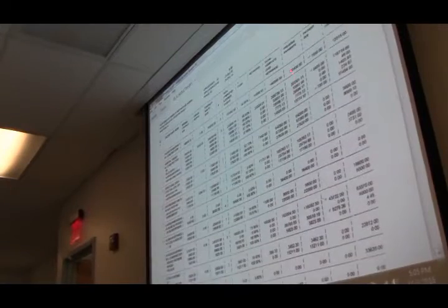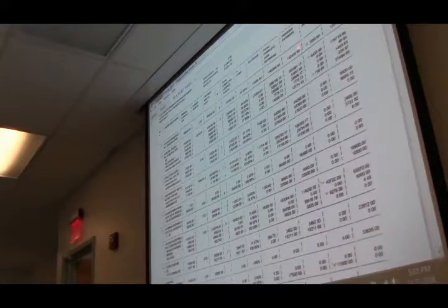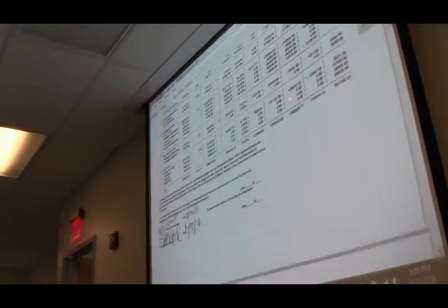Scroll to the top just to make sure I have my columns straight. Previous payments and payment due. Okay, we can go back to the bottom. Previously, we've paid just under $1.6 million. We're requesting approval this month of another $120,000, leaving a little over $550,000 left on the project. Essentially what that tells you is it's about 80% complete.